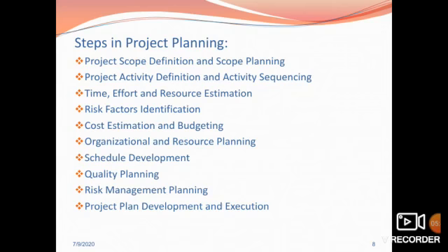The steps in project planning are given here in various steps. First, project scope definition, then activity definition, activity sequencing, time sequencing, effort and resource estimation, risk factor identification, cost estimation, organizational resource planning, schedule development, quality planning, risk management planning, and project plan development and execution.